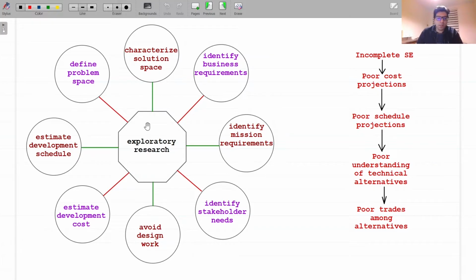The preliminary concept is a starting point, not an end point. As the project moves into the concept selection activity of the concept stage, the preliminary concept is not put under configuration control. The key output from exploratory research is a clearer understanding of the business or mission requirements and the stakeholder needs, an assessment of the technology's readiness to move to the next stage, and a rough estimate of the project cost and schedule requirements and technical feasibility to first article delivery.